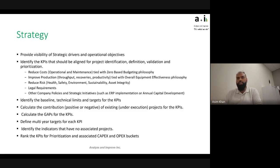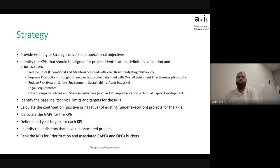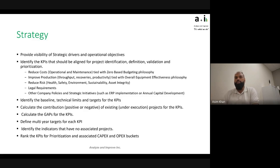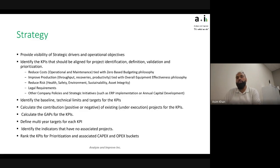A KPI or goal could be reducing costs — operational, maintenance, or costs in a specific area. If you have that as a strategic driver with an associated objective, there'll be a KPI we can use to measure how much a project will impact it and whether it actually made a difference. Zero-based budgeting philosophy is a good thing to tie your strategy definition to. In simplest terms, it means looking at your costs fresh every year rather than carrying forward last year's budget.